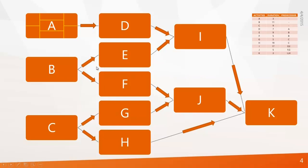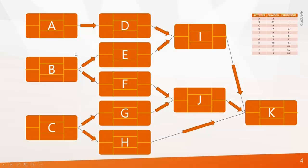The same technique is adopted to sequence activities in construction. I recommend from experience that all activities need to be arranged based on logic. Now, the next step is to give duration to the activities. In real-time scenarios, experienced planners and civil engineers decide the duration of every single activity — those activities can number up to 10,000 to 20,000 or more. Here, duration of activity A is 3, B is 11, C is 9, and so on.